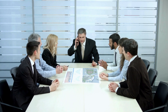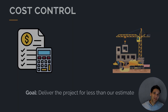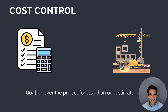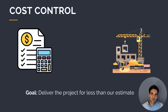Once we've won the project — we submitted our letter of offer and the client awarded us the contract — we now need to complete the project for less than our estimated costs, so we need to control costs. The goal of the cost control process is to deliver the project for less than our estimate. We've got a fixed lump sum amount we need to complete all the construction activities for, and now we need to make sure we spend less than our budget.